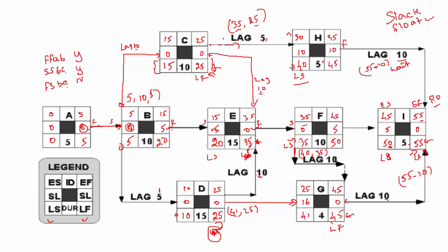All right, let's do one here. Watch this. Is this relationship critical? C and H, what is the relationship? Finish to start. Is finish to start C and H critical? So we got 0 here and we got 10 here. So no, it is not critical.